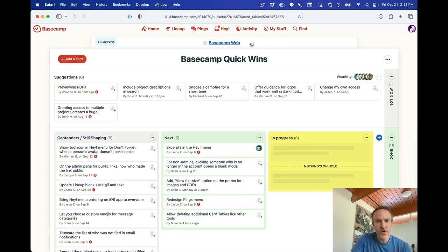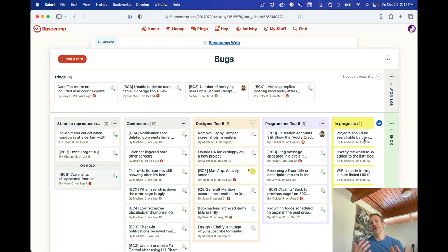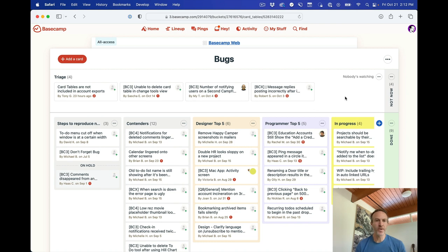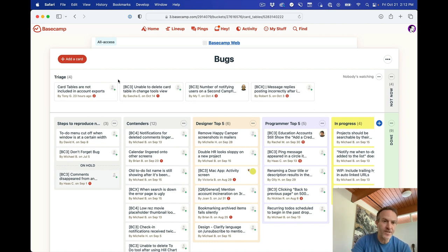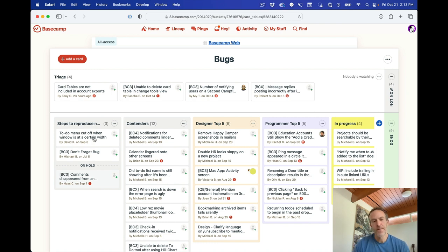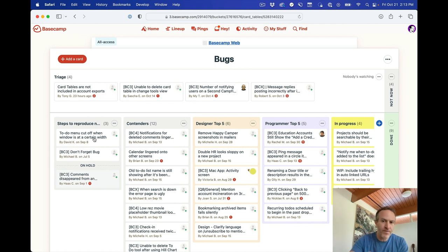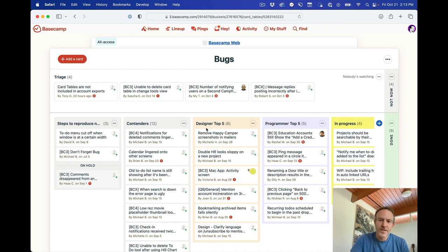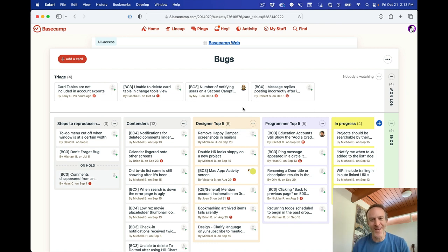So let's go back one more level here to the bugs card table. People have often asked us, how do you guys manage bugs using Basecamp? Well, here's one way we're doing it, which is we have a card table set up called Bugs. And we keep track of those here. So anytime there's a new bug that's reported, it can be added to the triage. People can then move it down into what's called steps to reproduce. And once that's reproduced, we can move it into contenders, then move it into what's either called designer top five or programmer top five. I know there's actually six. This is the number in the top five. We live in an imperfect world. That happens sometimes.